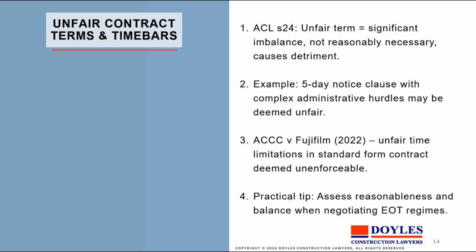So there's a case there of the ACCC versus Fujifilm, when unfair time limitations in a standard form contract were deemed unenforceable. So the situation is one should agree and negotiate to have reasonable provisions, and then one should comply with those provisions very carefully.